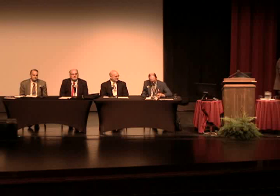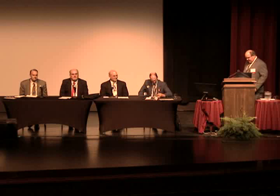Training not only needs to focus on how to do the work, but also how to do the work safely. Okay, and then my response on that: total maintenance differs greatly from construction contracts or even maintenance contracts where there are work units with prices furnished for work that is identified and directed by the department personnel. For a performance-based total maintenance contract to be effective, the contractor must staff the project with personnel that identify work to be performed. They must be proactive.